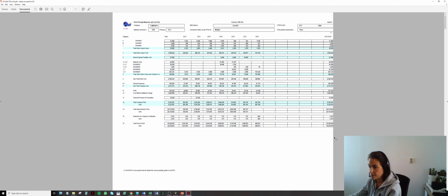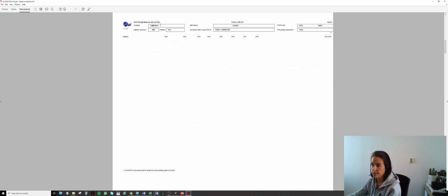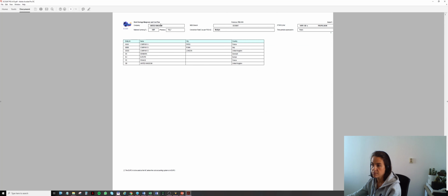So this will also be matching our other forms. And please note that normally if you're producing all these PSS forms, the totals should always be the same from one form to the other. The total price to ESA should remain unchanged. The way of breaking down the price is specific to each report. So now we see here ITT1, company A, company B, D, and every time, also for your budgetary subcos, we see that it's empty.